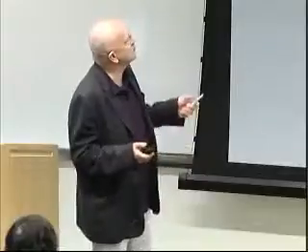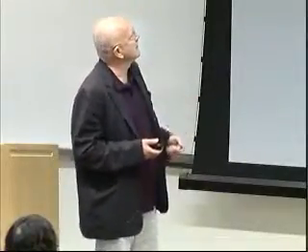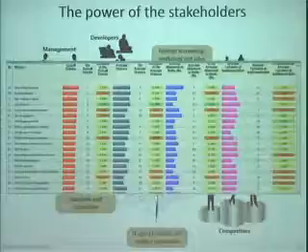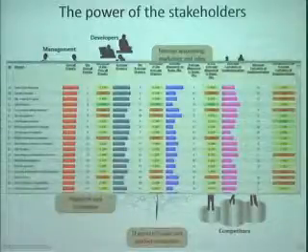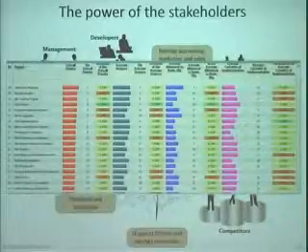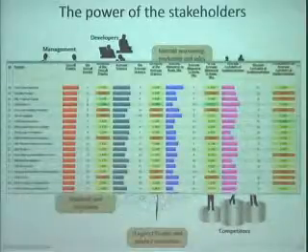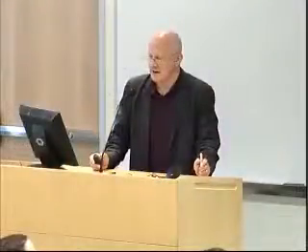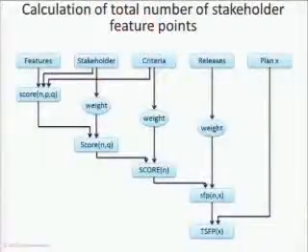And here you see already a first screenshot from a tool we have in place to support this process. What you can see here is different candidate features. You can see different criteria like urgency, alignment to business objectives, or certainty of information you are relying on. You can get some input from the stakeholders from some kind of scoring or prioritization process, how important they consider the different features, and then you can rank these features by combining the different criteria, right? So that's one way to understand customer needs, and the more customers you can integrate into this process, the better the results typically can be.